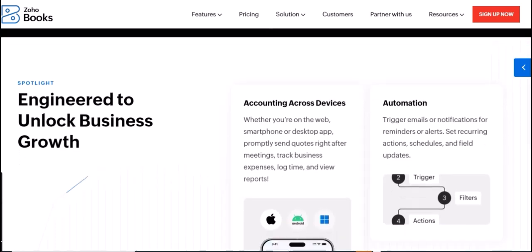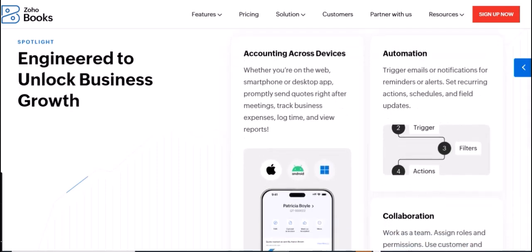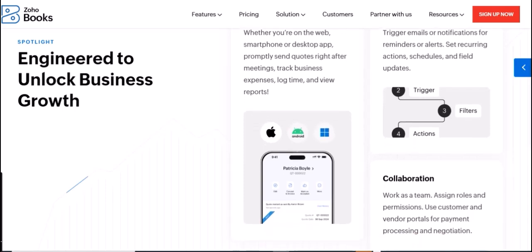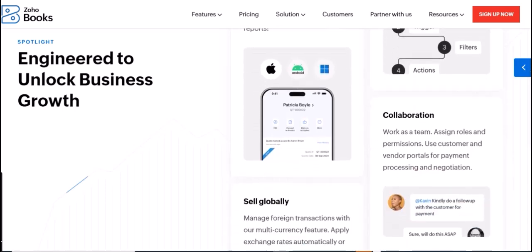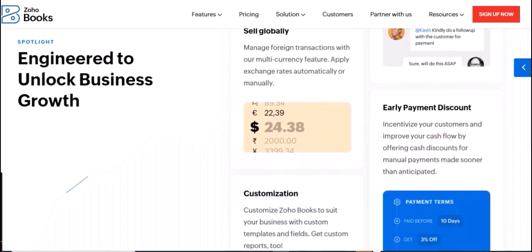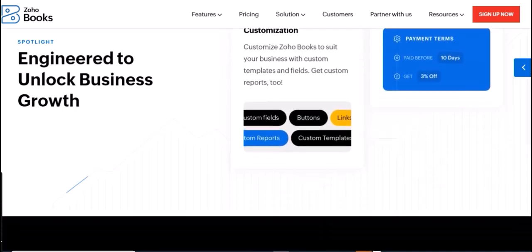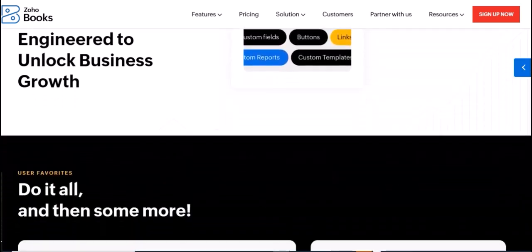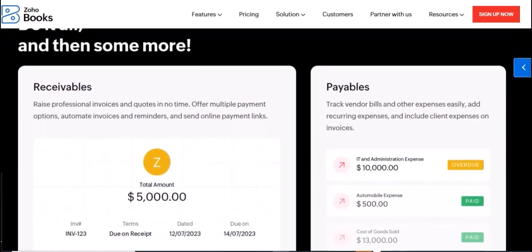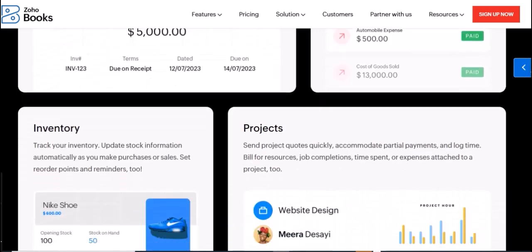When to use it: large or complex projects. For projects with clearly defined phases or deliverables, milestone billing provides a structured payment schedule. Client comfort. Some clients prefer milestone billing as it allows them to pay in installments based on tangible progress. Risk mitigation. It can help mitigate the risk of non-payment for large projects, as you receive partial payments along the way.